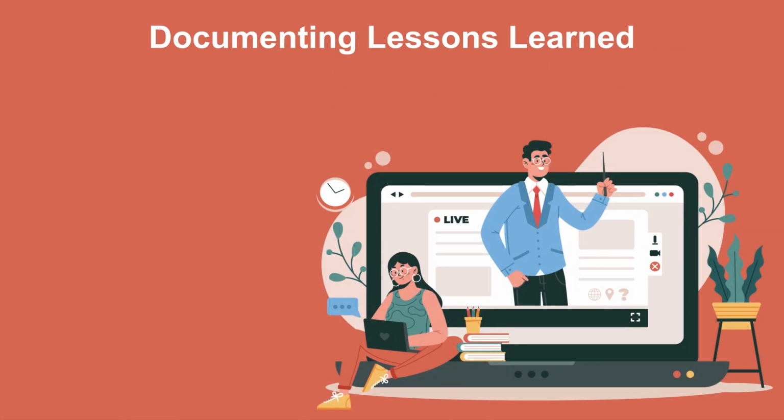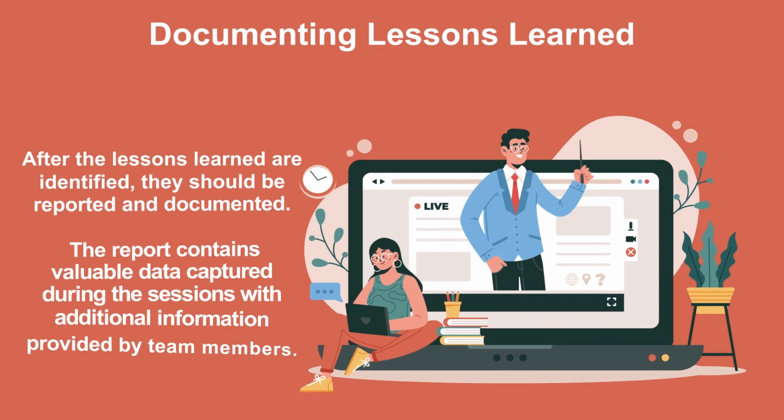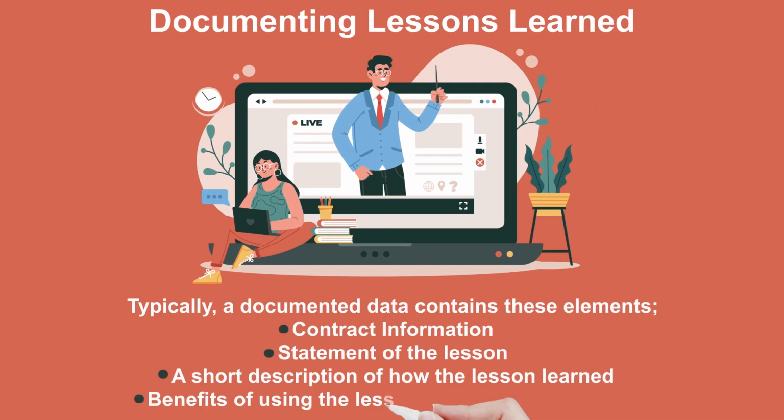Documenting lessons learned. After the lessons learned are identified, they should be reported and documented. The report contains valuable data captured during the sessions with additional information provided by team members. Typically, documented data contains these elements: contract information, statement of the lesson, a short description of how the lesson was learned, benefits of using the lesson for the current project,